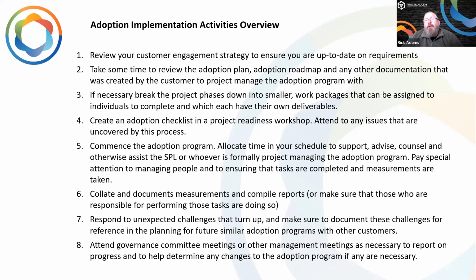It may include going backwards and forwards between doing things and reporting to decision makers, and particularly where you uncover something new. It may be that you don't have the authority then to go ahead and make a decision about it. Maybe you uncover, for example, a group of users that had not been identified, but that do have change management requirements, and we haven't thought about them, and now we need to, and it's going to have additional cost or time implications, or we need the authority of the team leader to ask for time for that team for them to undergo the training, for example. So that would be examples of where we might need, as it says there in number 8, to maybe organize a meeting and have some senior stakeholders in that meeting, take them through what we've uncovered, what our recommended activity is, and then let them make that decision as an example.